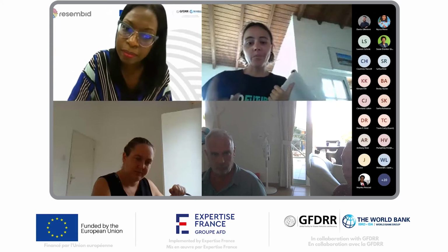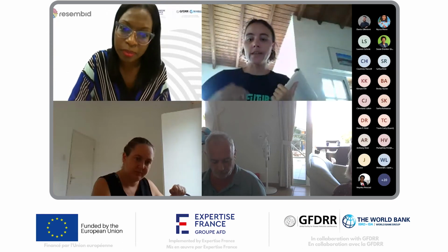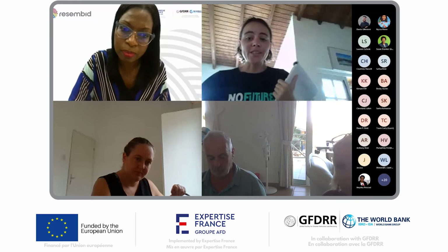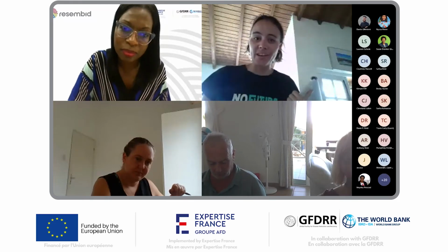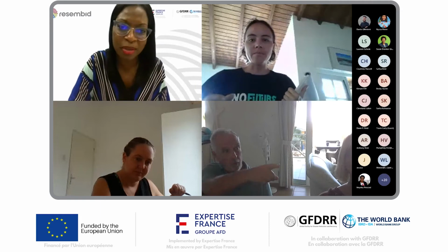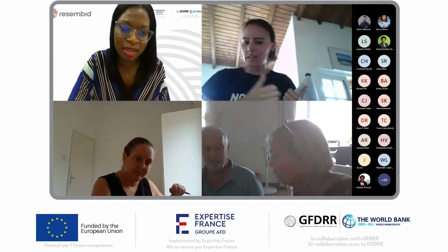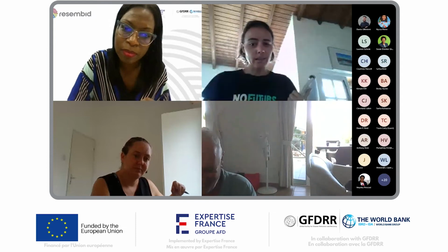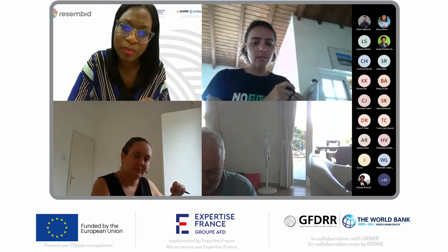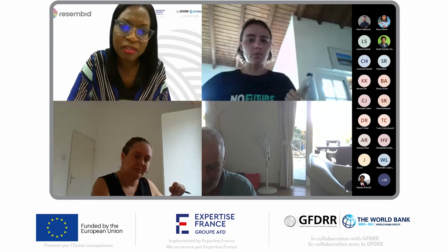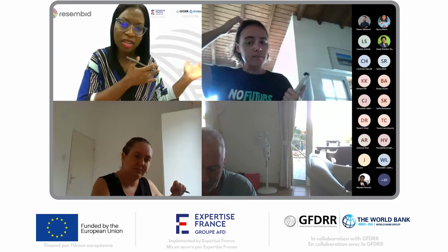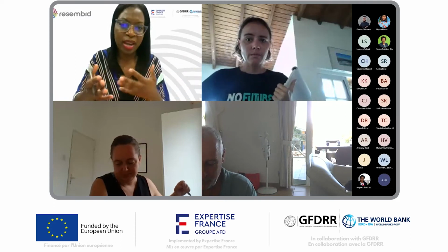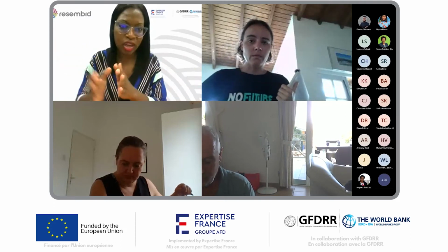Yeah. What if it's the opposite? What if for some reason, like in scheduling an expert, they couldn't do the date that we had scheduled two years ago when you wrote the application, but they can do earlier? Same thing. Okay, but in the list it would still say the planned day, and the end day would be before the start date. That's fine. Everything is just starting earlier. So all you need to do is provide an explanation for this in the notes section.